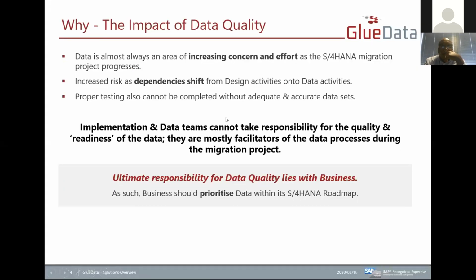Data was loaded, and when presented with the sign-off reports, the business got a serious fright. Needless to say, this caused data integrity and reference issues and posed a massive risk to the project during the cutover. The data loaded first had to be removed while business prepared the final data set, and before the load had to be done again.